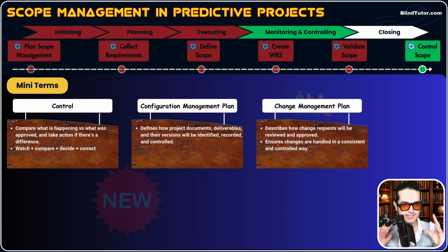One stakeholder, stakeholder A, requests a change to a deliverable from team A. And another stakeholder requests a change to another deliverable from team B. These two teams need to handle this request in the same way. How do they handle it in the same way? By reviewing a document called change management plan, because it's a how-to guide. It's instructions, manuals on dealing with change requests.